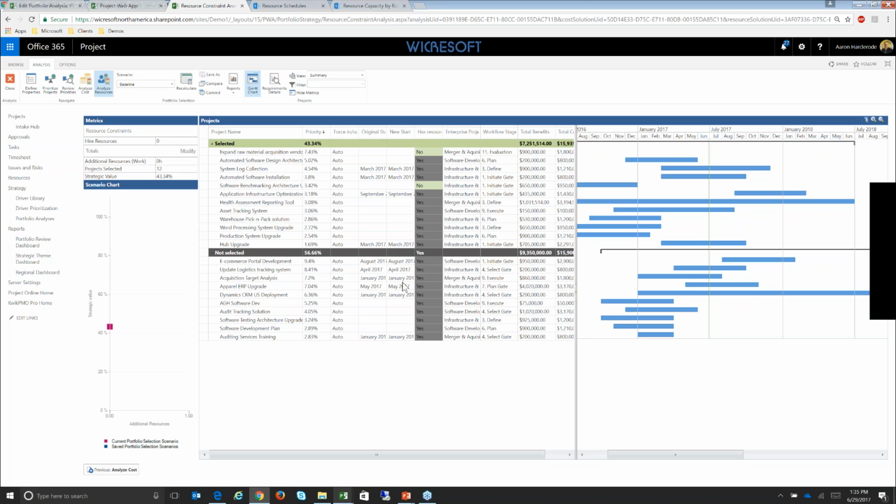Okay, and of that, what this is telling me is of the 22 projects you're analyzing, you actually only have the ability from a demand perspective to do 12 of these projects. So, under or just over half. Now what you can do, you take some time with this. I'm going to go over it relatively quickly here, but you can take a look at how much these projects overlap. Okay. Take a look at what the requirement details of the projects are.